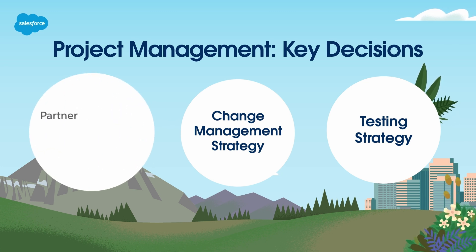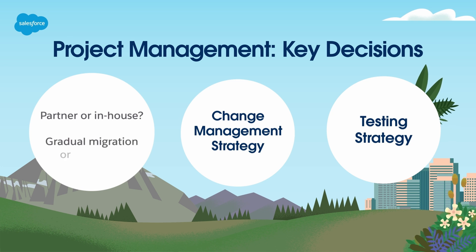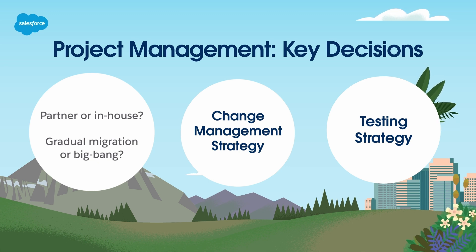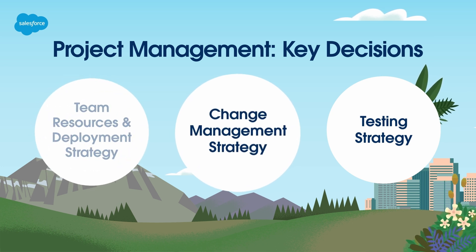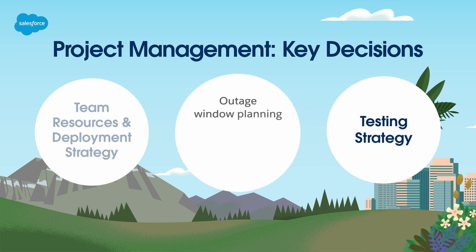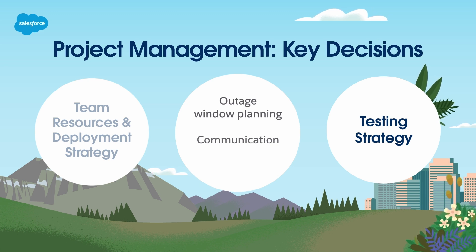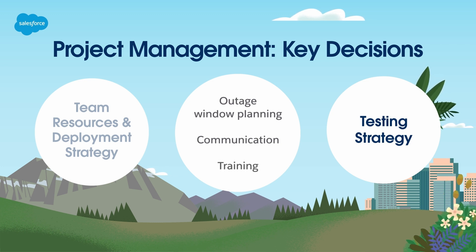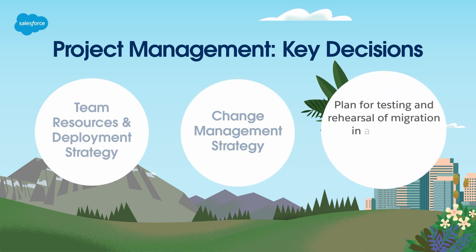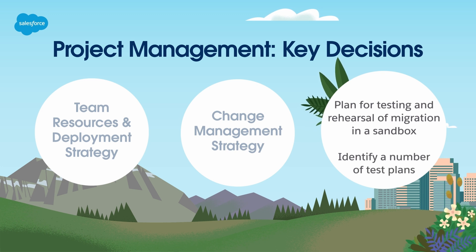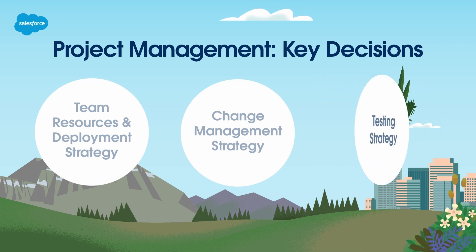These roles can be filled in-house or with partners. You'll also want to decide on a gradual migration or a big bang approach. Salesforce usually recommends a big bang approach in most instances to ensure clean cutover and avoid confusion when importing data. Next, consider your change management strategy by asking the following questions: outage window planning — how will you know how long it will take? Communication — how will you communicate your project plan? Org merges and splits have high visibility with direct impact on users. Training — what will be different for the new org and existing users? For your testing strategy, plan for testing and rehearsal of the migration in a sandbox. You should identify a number of test plans based on real business scenarios. You'll also want to test the metadata and the full data load separately.